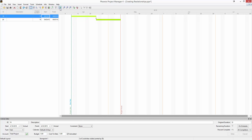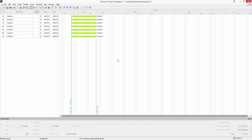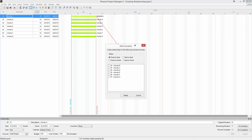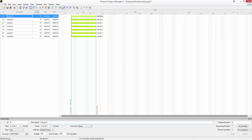I can schedule it to see what happens. If you accidentally drop a relationship while the dotted line is still red, a window will appear. It will still let you create a relationship — it will ask you what type you want and give you a list of activities to create relationships to. One of the cool things is you can create relationships to multiple activities at once just by checking the box and clicking the relate button. Once I hit the schedule button, you'll see all those relationships in the schedule.